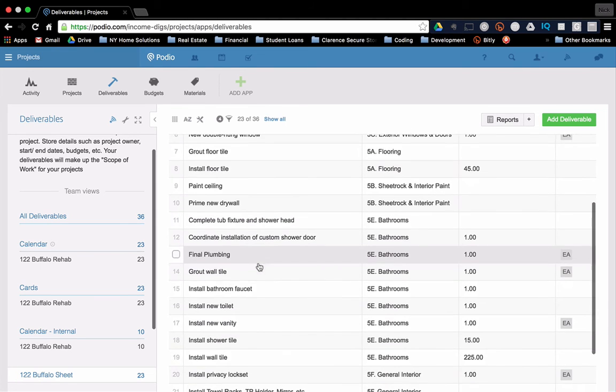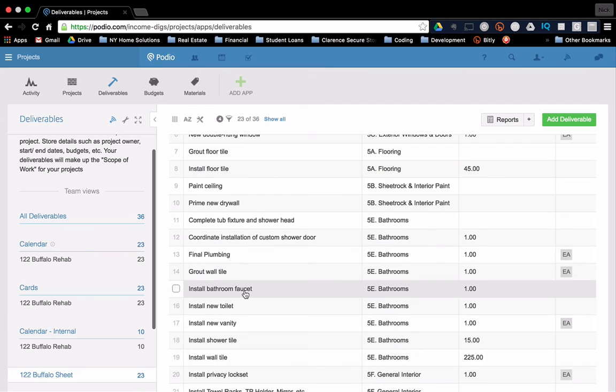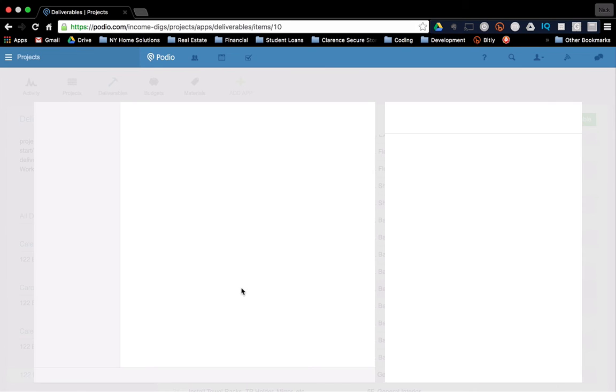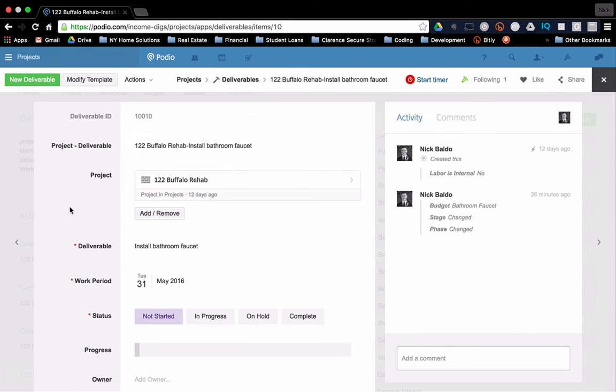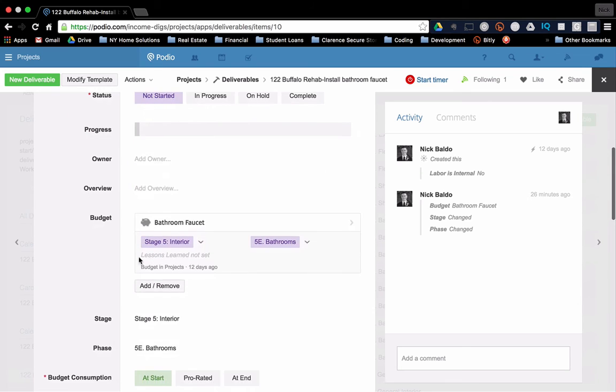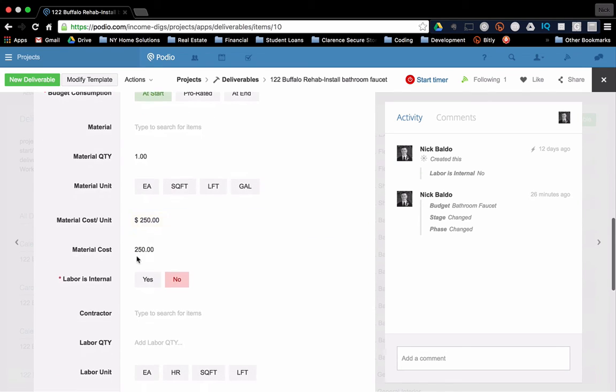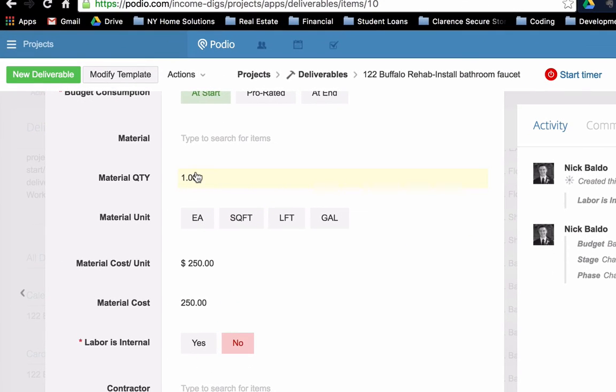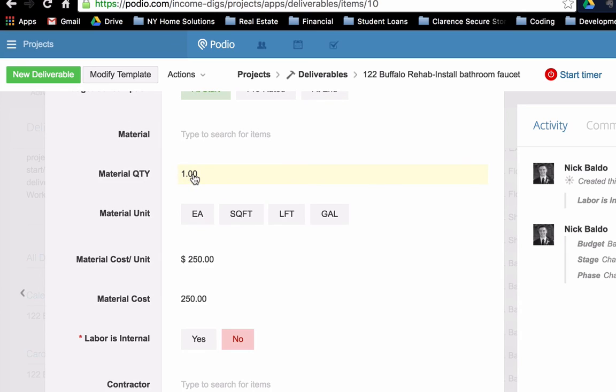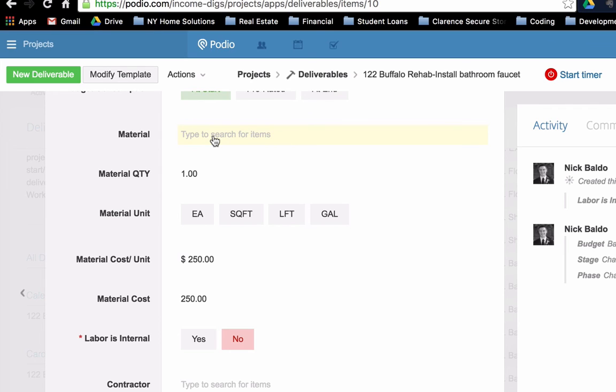Let's take something like the bathroom faucet. Here's a task. Okay. Here's a scope item. All right. As we're planning this rehab, we need to install a new bathroom faucet. Simple enough task. Okay. Let's scroll down and see what's going on here. So now right now you see I have a material quantity of $250 times $1 is $250. Now, I have this material field. And what this is for is to tell me what is the exact material that I'm going to use here. So for something like this scope item, something like a faucet, something like a floor, maybe a toilet, maybe a cabinet, something like that, it makes sense to store materials that you've used in the past and track within your projects those that you use again.